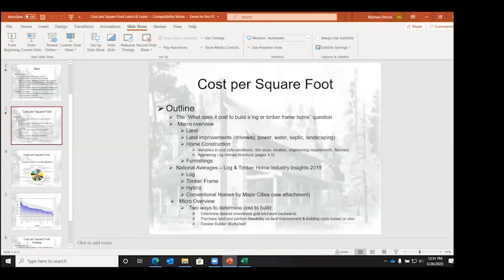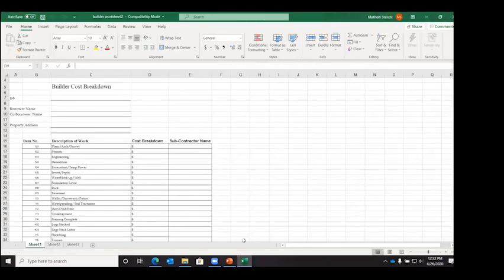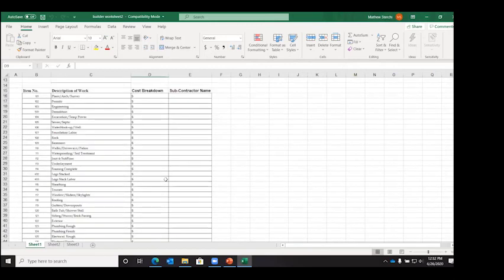And so when we do our preliminary design process, for example, we start working with a client and take them into a preliminary design phase where we do floor plans, elevations, and a foundation plan, and then we make a round of revisions, and then we send that out with our good faith estimate on our log and timber components and the labor that goes into building those components. And then we give you that good faith estimate for you to take to your contractor, for him to then go through his worksheet, which I'll share here. And again, this is just a boilerplate worksheet from a lending institution. And then you can go out and start plugging in numbers to these line items, right? What is it going to cost to do?